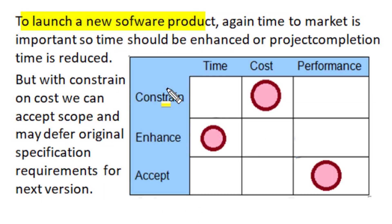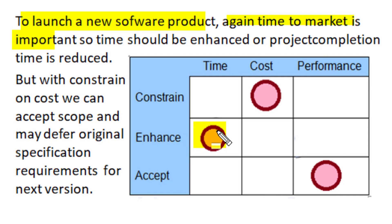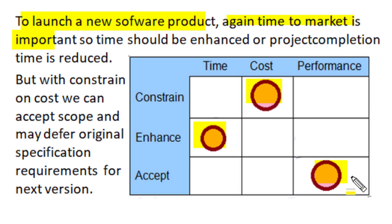Similarly, to launch a new software product in the IT industry, time to market is again important, so project completion time should be reduced. However, we cannot go over budget as cost is constrained. So we can accept the scope criteria — deferring some original specification requirements to the next improved version of the same software. This software product will be produced with enhanced time, constrained cost, and accepted scope.